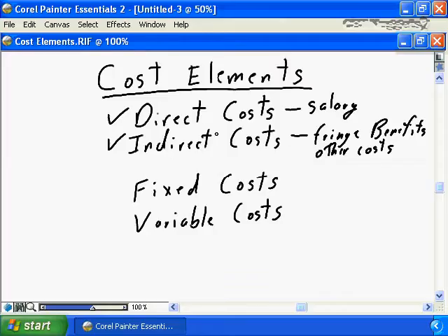If you need to buy materials, if you need to buy a specific piece of material for your project, the direct cost would be the cost paid to your supplier for the material. But what about the indirect costs? What about the time for the purchasing agent to go out and negotiate a deal? What about the transportation costs to receive the material? What about the storage costs and the receiving costs to receive the material into your organization and potentially store it for a period of time until it's used by your project?